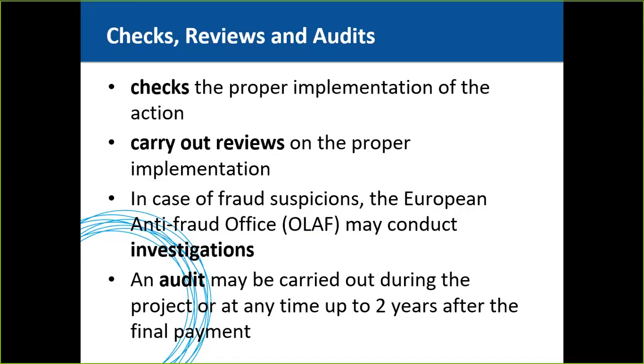Reviews normally refer mainly to the technical implementation of the project, but may also cover financial and budgetary aspects. Reviews may be started up to 2 years after the payment of the balance and may include on-the-spot visits and checks. In case of fraud suspicion, the European Anti-Fraud Office, OLAF, may conduct investigations too.